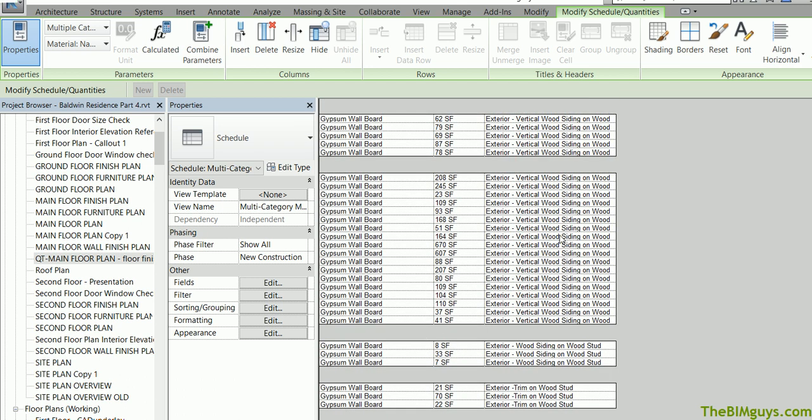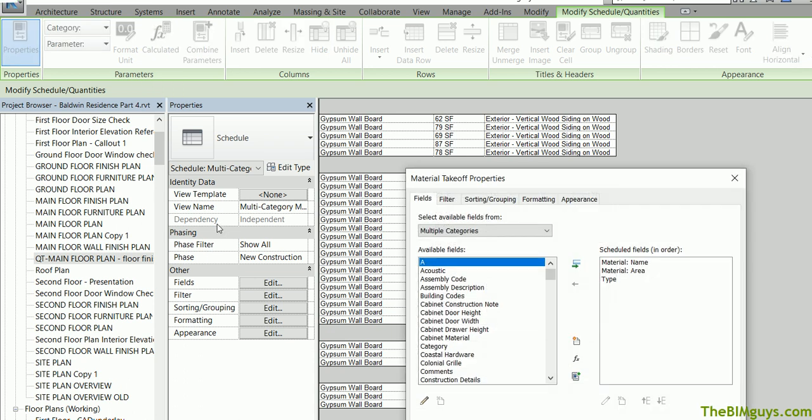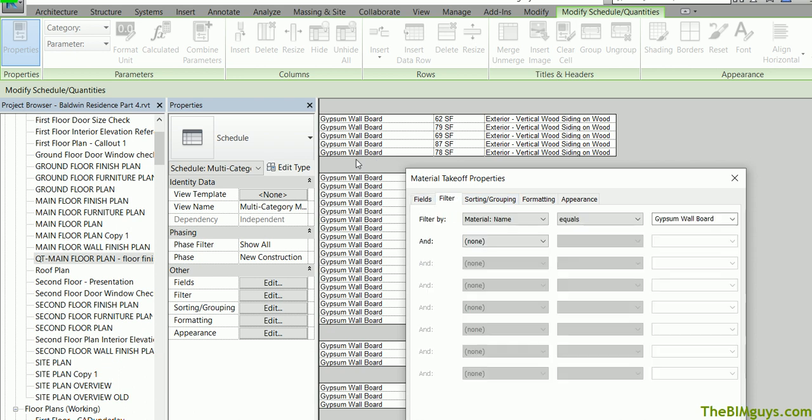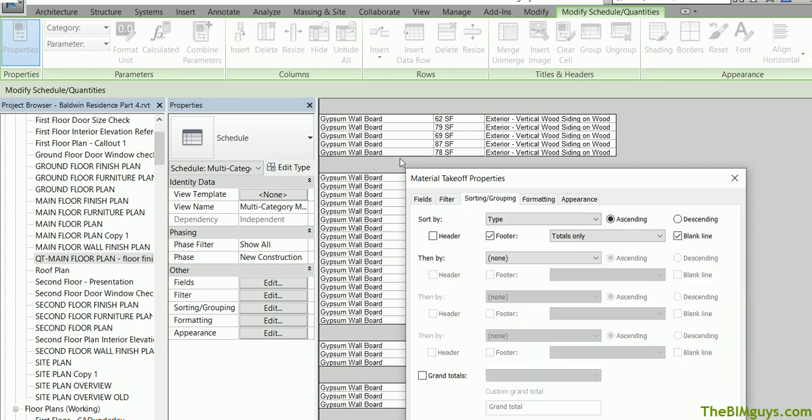Let's go hit our quantities now. Heading down the list, I'm going to go back to the beginning. Here we are. That's fields, filter. We filtered out the particular gyp board. Sorting and grouping, we're happy with that. I'm going to say grand totals. By putting this on, it'll give us a total grand total of the materials that we're using.